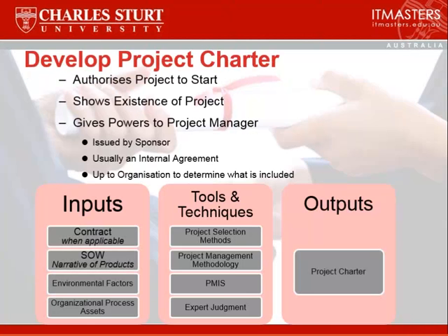Developing a project charter. Essentially a charter is what the project manager is given, which authorizes the project manager to start the project. It shows the existence of the project and gives power to the project manager, and it's usually the sponsor who issues the charter. It's usually an internal agreement, and what's included in there is really up to the organization. But these are all the bits and pieces of information and documentation that's used to create the charter, so that you understand where the project is heading, what is the scope of the project. And don't forget, you've got the environmental factors and organizational process assets as we discussed before. These are the various tools and techniques that we put together to create the charter, and out the other end comes the charter itself.